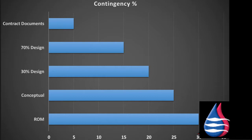It's impossible to expect the engineer to develop a perfect set of construction documents, so during the design phase when they're doing the budgets, there could be a contingency factor for those allowances. The owner contingency covers an allowance for scope changes that are unforeseen at that time but which the owner could be financially liable for.